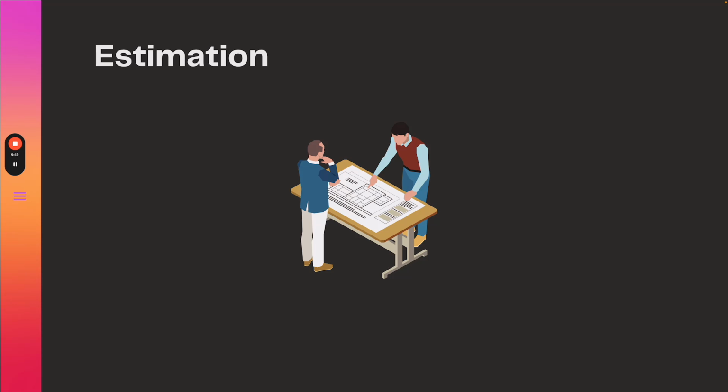Then think about using some estimation techniques such as planning poker or 3-point estimation to arrive at a consensus estimate, of course, if you're in a team. So some good tools there: t-shirt sizing, planning poker. That really helps you get a feel for what it is you're going to be building in terms of effort. Account for contingencies. So you need to build in contingencies for unexpected events or changes in the project. And this is true in a formal project environment, but also as a hobbyist. So you may think you've got a Saturday and Sunday to build your project on the side, and you might have it published by X date based on that.